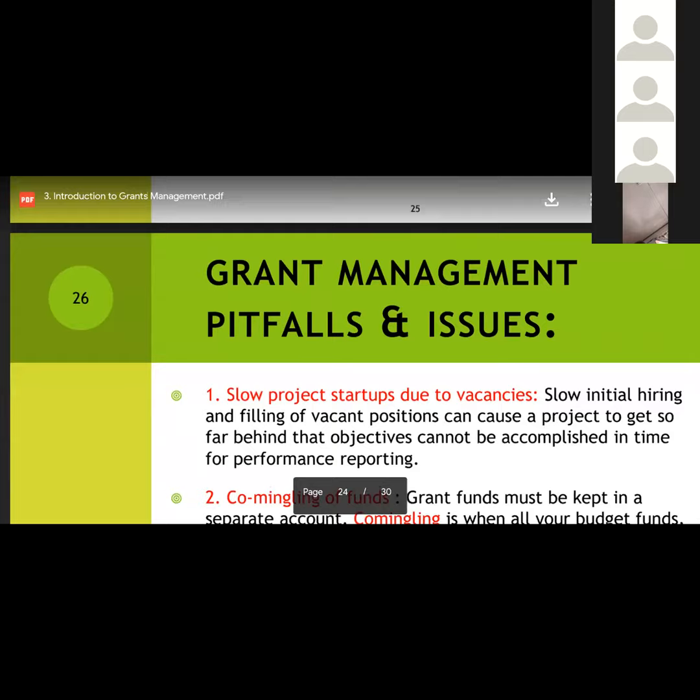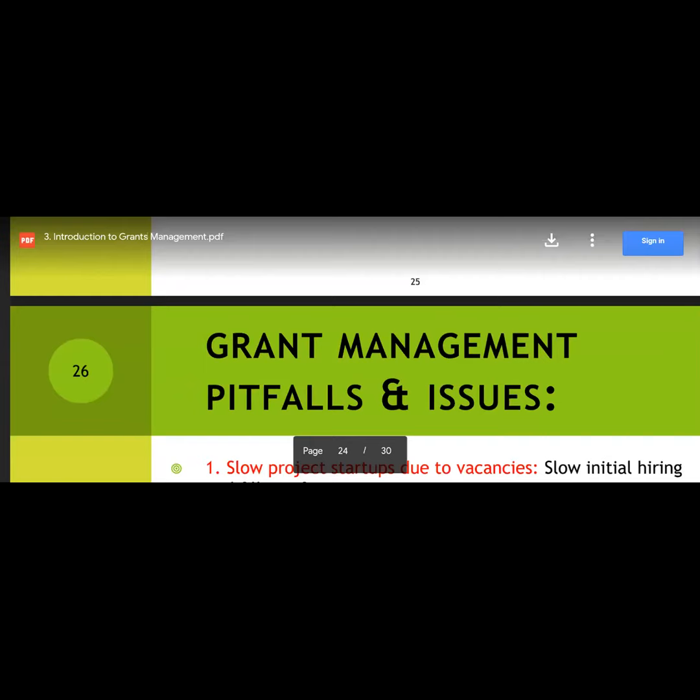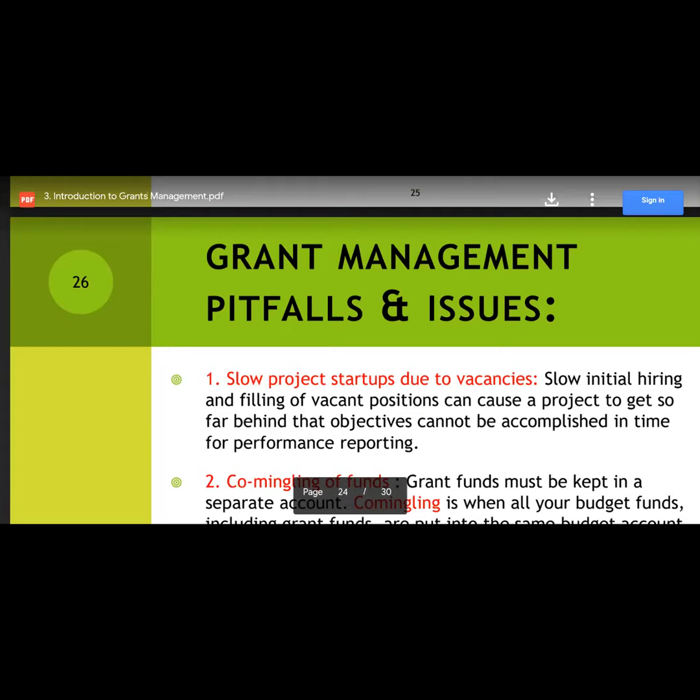One of the things that we always find is a challenge is simply the slow project startups due to vacancies. If we have a slow initial hiring and filling of vacant positions, this will always cause the project to get far behind the objectives that cannot be accomplished in time for performance reporting. This kind of delay in vacancy filling normally challenges most of the projects. It is important for us to understand that filling of vacancies can really challenge most projects as expected.